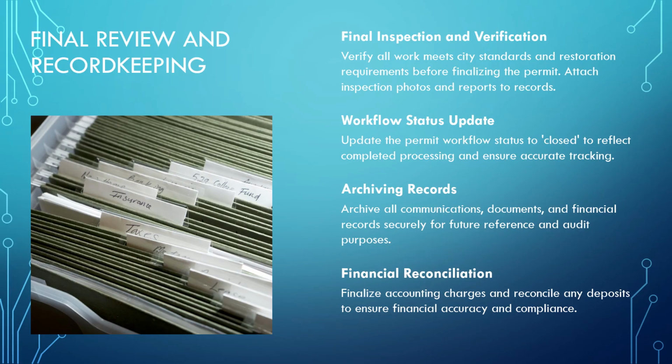Ensure that any accounting charges for inspection hours are finalized and that the deposit, if applicable, is reconciled. This final step is essential for maintaining accurate records and ensuring compliance with city policies. Proper closeout procedures also provide a clear audit trail and support accountability for both the city and the applicant.